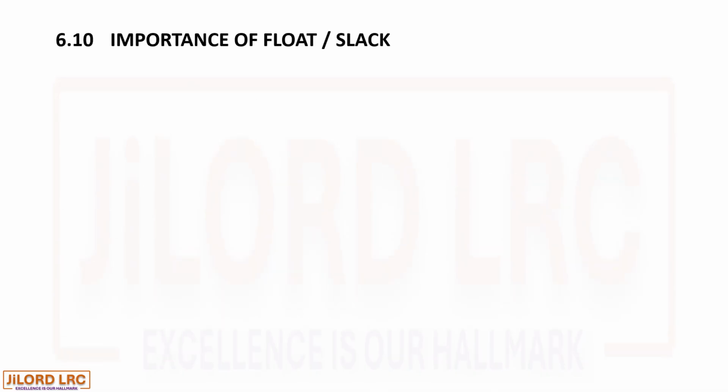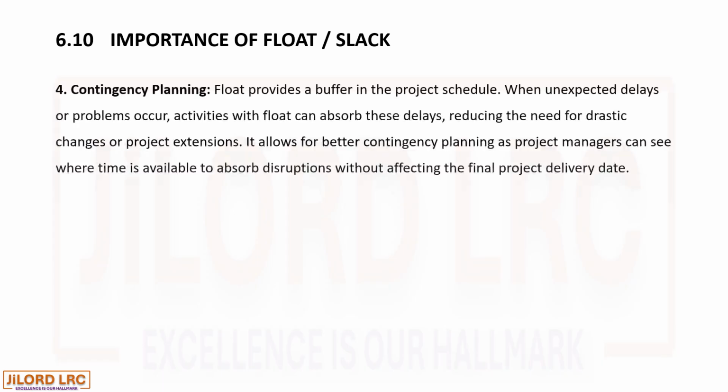Importance of float continued. 4. Contingency planning. Float provides a buffer in the project schedule. When unexpected delays or problems occur, activities with float can absorb these delays, reducing the need for drastic changes or project extensions. It allows for better contingency planning, as project managers can see where time is available to absorb disruptions without affecting the final project delivery date.